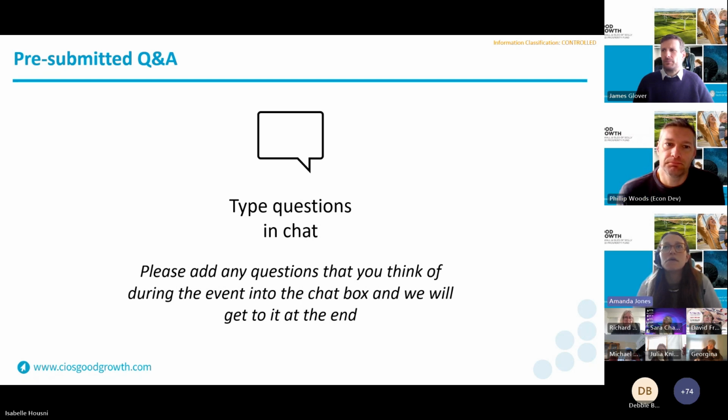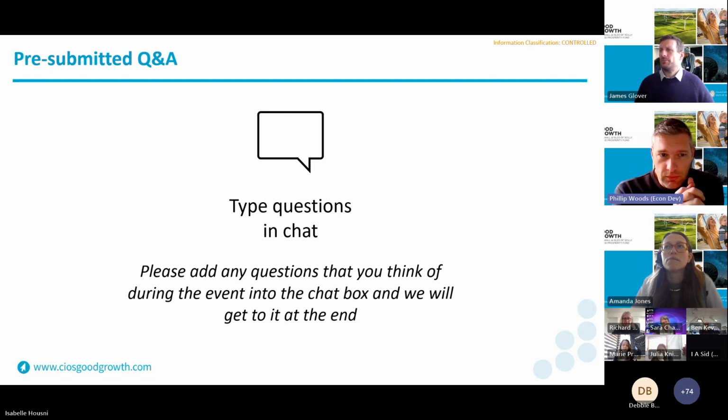Thank you. Number 17, is there any merit in collective procurement by a number of similar projects? The tendering and procurement value thresholds are aimed at individual project holders. If you collectively procure, you could put the value of the contract into a different value threshold, which may need to be advertised differently. So it's just to be aware of that. There is also the challenge of who is responsible for ensuring the process delivers the required goods and services to the correct specification, and how payment and grant claims would work.